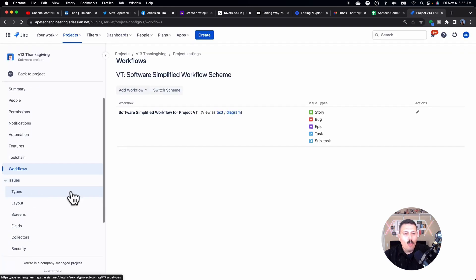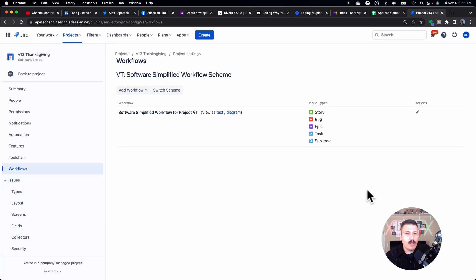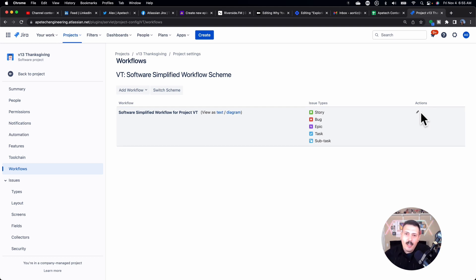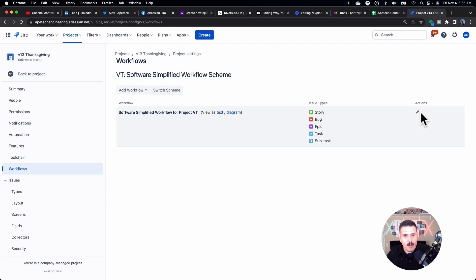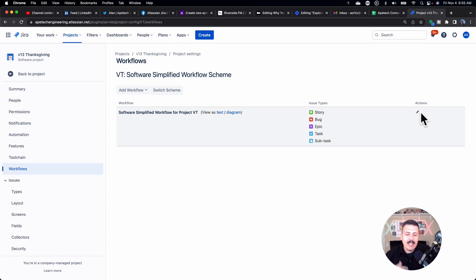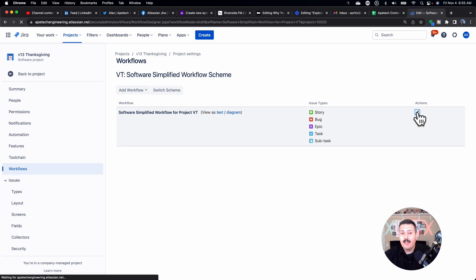Now, one thing to note, because we are not going to be deleting statuses, we're simply adding statuses, I can do it through here by clicking on this little pencil. But if you have a workflow where you want to delete statuses, you're not going to be able to do it from here. You're going to have to go to the main workflow, make a copy of that workflow, make your modifications there, and then come back into your project and reapply that new workflow. Again, this is only if you want to delete, but since we're not going to delete, I'm just going to be able to click on the little pencil here and get started.